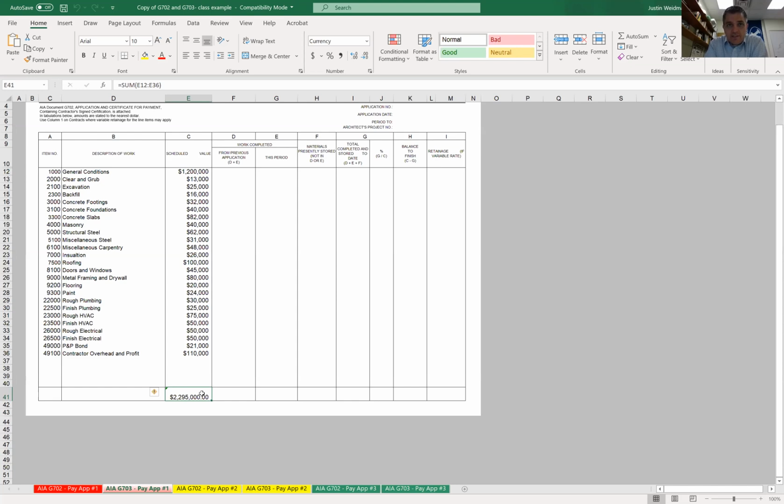And so usually this is set forth in the contract. So you'll create your first pay application amount with the budget that you're going to be billing for on a project. It includes that schedule of values to help the owner know what they're paying for, right?